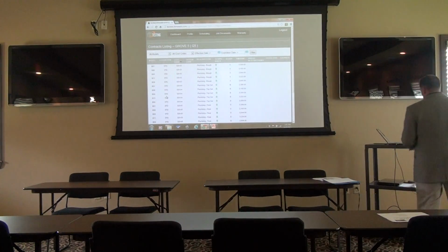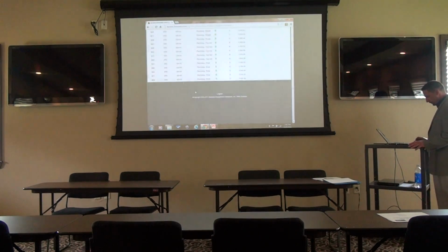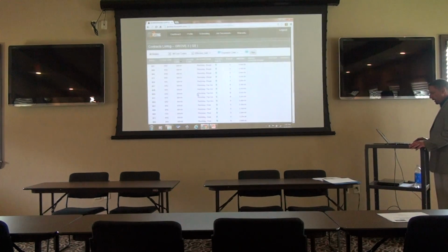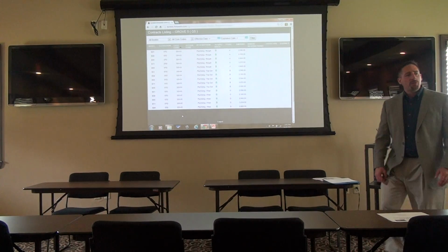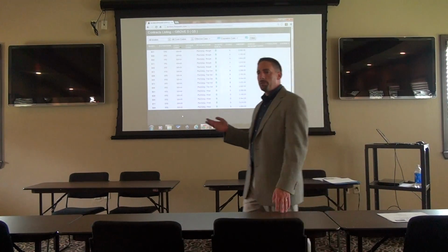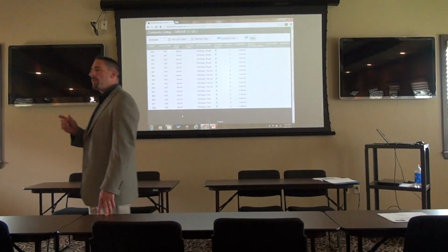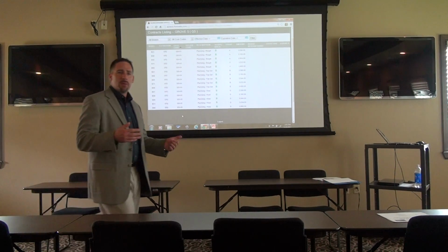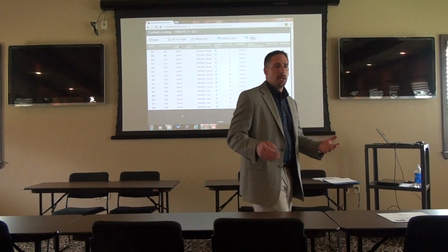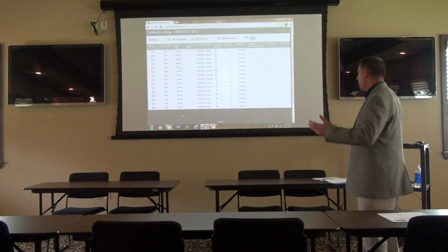So if we scroll down a little bit, I guess we don't have any options on this one. The options would be down here, and the last two numbers here are like 01, 02, 03. The options are always coded to 51. Okay, that's the difference about options. They're coded to 51. And if you're in the trade that needs to be paid multiple times for one option, you'll have a 51 and a 52. Most of the time, everybody gets paid on a 51. And it just combines with like the last draw that you would get. All right? But you all might be different.